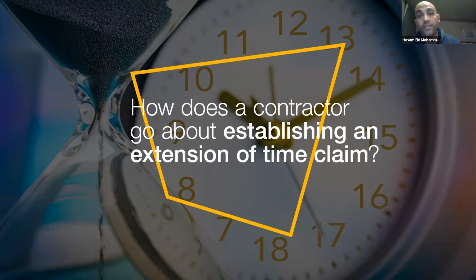And from this point, the analyst can start with the second process, which is the quantification of delay in two main moods. The retrospective, the actual mood, if we have events that are finished and done, and we can hindsight the records associated with these events, or the prospective mood, the forecasted mood, the blind side, which is related to events that are going to occur, or we have the event in place, but the discrete work of the event has not occurred yet. This shall determine whether the event records are actual or estimated in this quantification of delay.